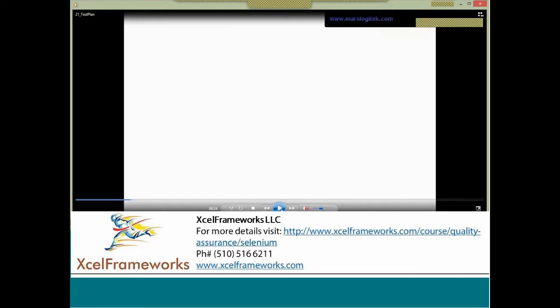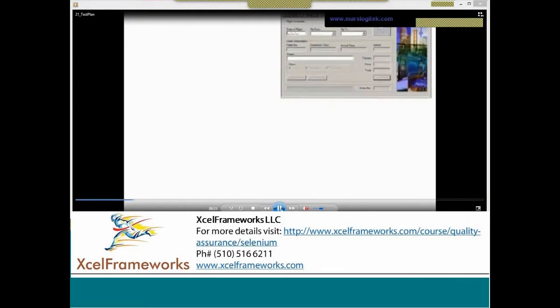So by the end of the meeting, you will collect all the estimates and say, hey, I need 10 hours of solid testing for this plan. So you'll shoot out a mail: this feature will take this many hours and this person is working on it. Based on this, everything needs to be included in the test plan.